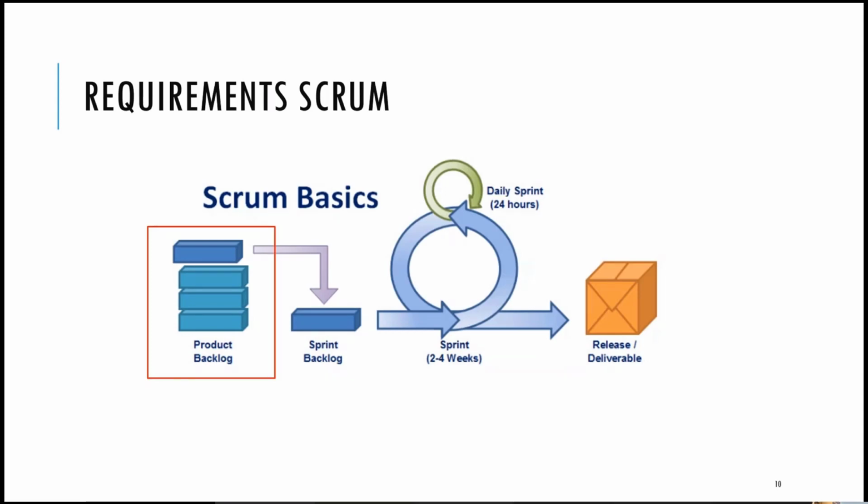In this picture, you see a simplified Scrum framework. It looks similar to the waterfall because the requirements engineering is at the start, for the backlog. And it could lead to the interpretation that the product backlog is full and you just put it into the sprint backlog. In reality, the product owner, the official title, does the same as a requirements engineer and works parallel to the engineering team. Requirements have to be gathered, and in my experience, the product owner was always one or two sprints ahead. So the work is done when the project meets its end.